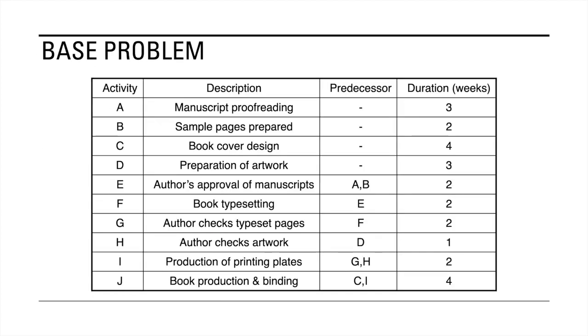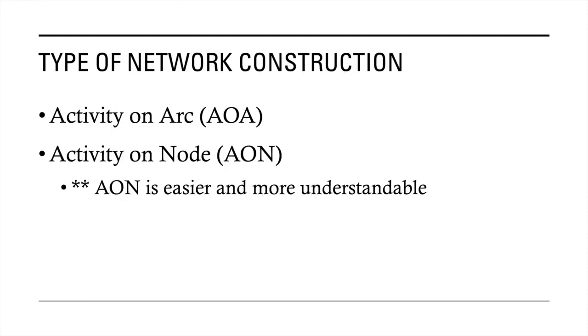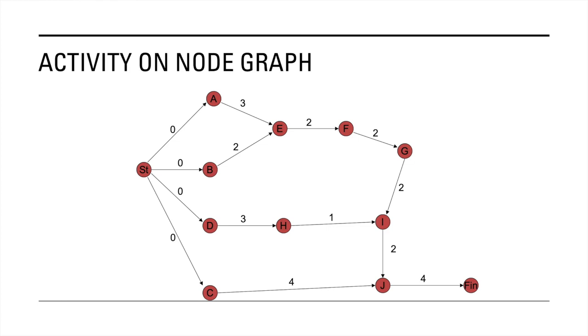Now, node E has a predecessor composed of activity A and B. And therefore, if you look at E, there are two inbound arcs, one coming from A and the other one coming from B. Given this, I hope you understand that the act of moving out of a particular activity is the act of doing the activity.